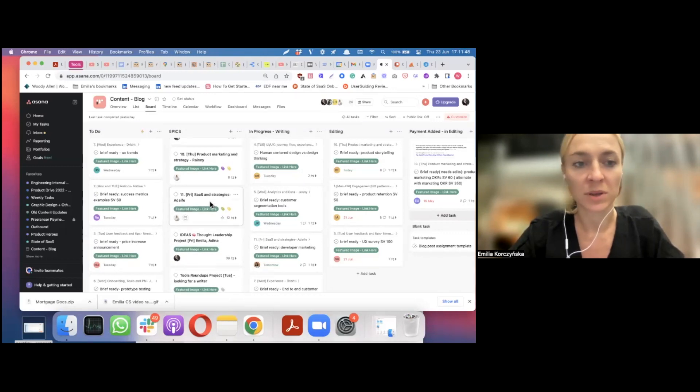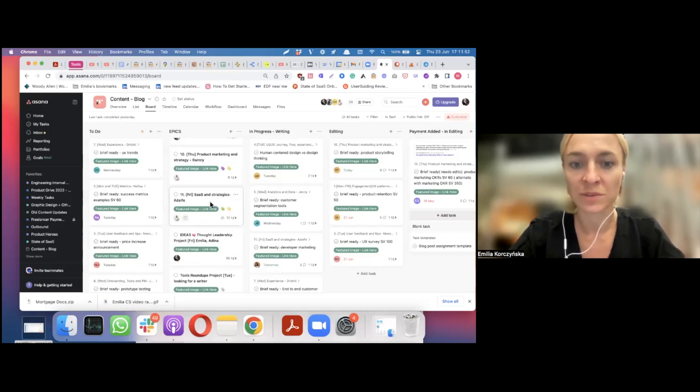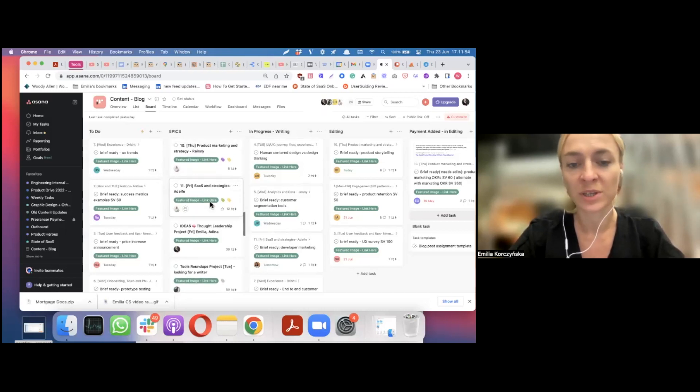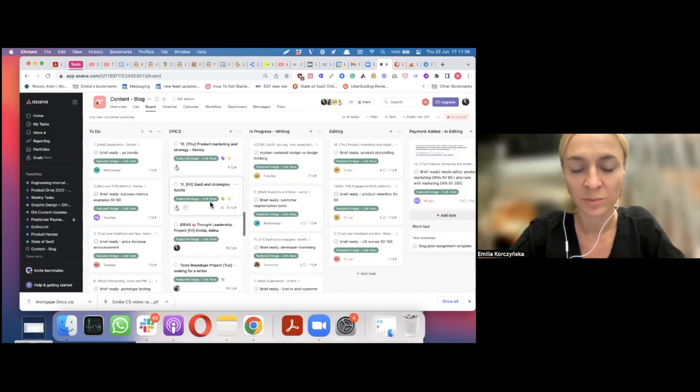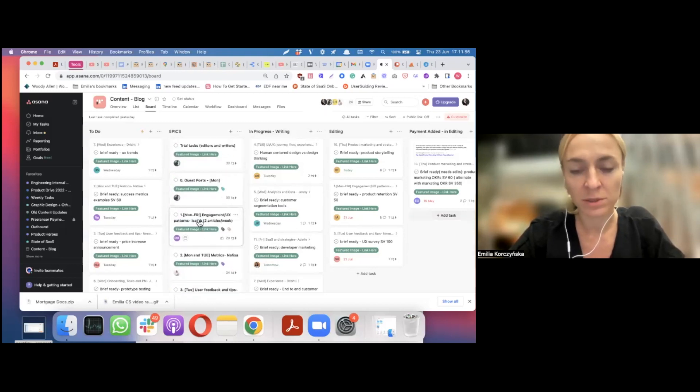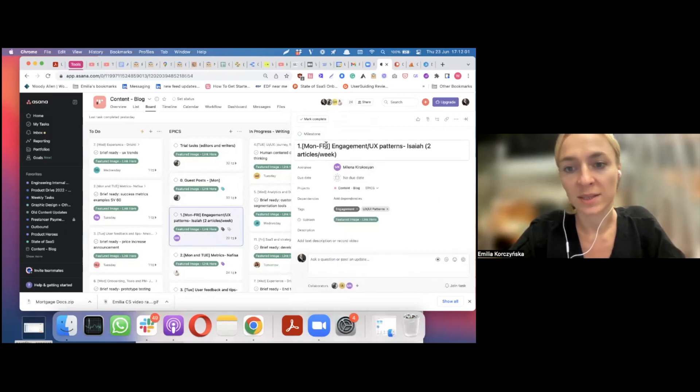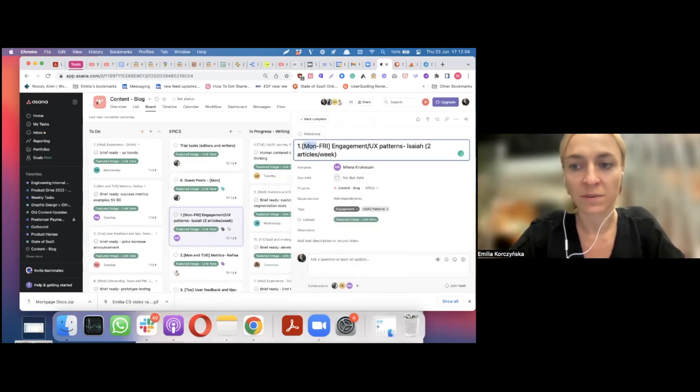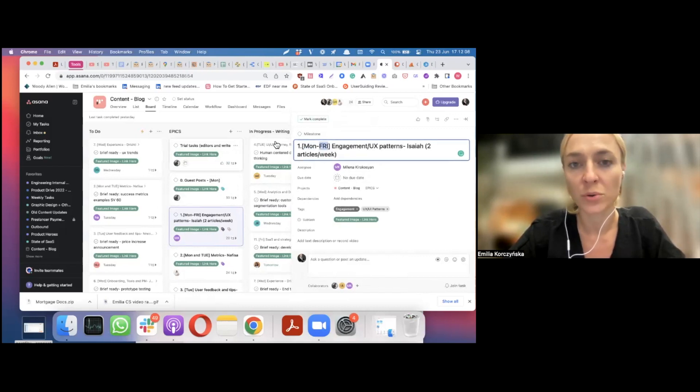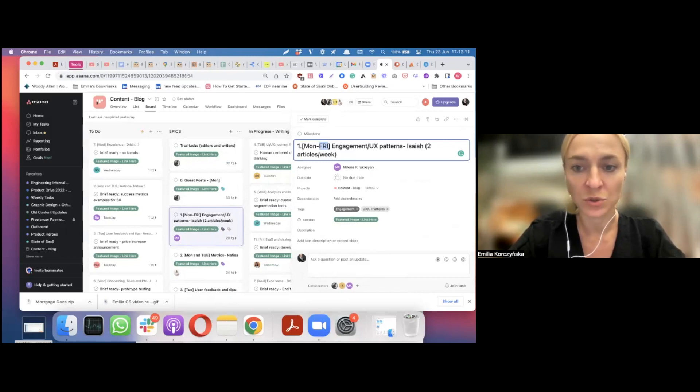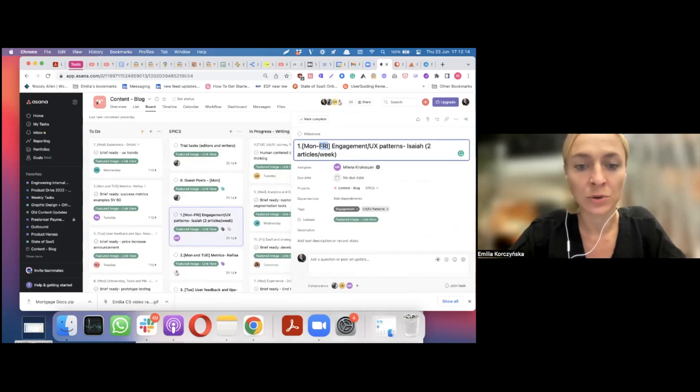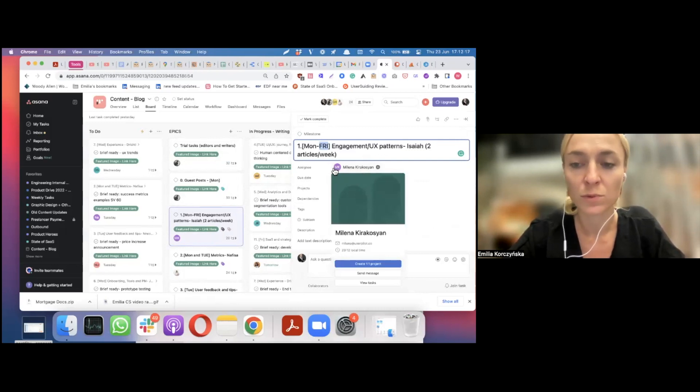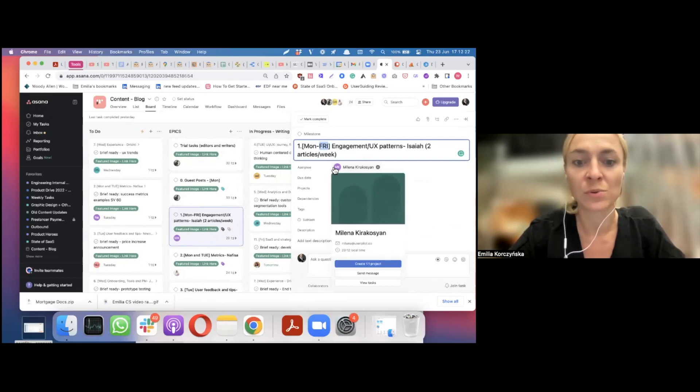You can use Asana, but you can also use any other Kanban board or even an Excel spreadsheet or a Google sheet if you're adventurous, but it's much easier to do it on the Kanban board. And then, each of these milestone tasks has a particular delivery date. So, if there are two posts, then there are two days of the week when posts on this epic are due. And each milestone task, each epic has one full-time content editor assigned to it. So, introducing this role was really a game changer.